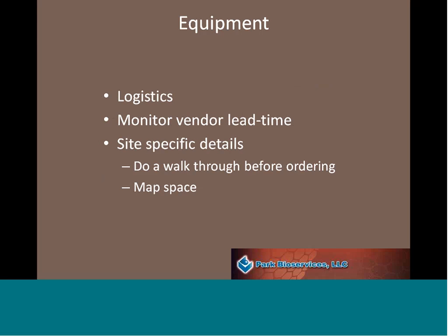Just to move on, in terms of the equipment, I can tell you that for Park Bioservices, our lead time can be as little as 3 or 4 weeks, depending on how busy the period is. It can be as much as 10 weeks. And it's very important to monitor that, because there's no point in ordering the animals and planning your study if the equipment isn't there and in place.